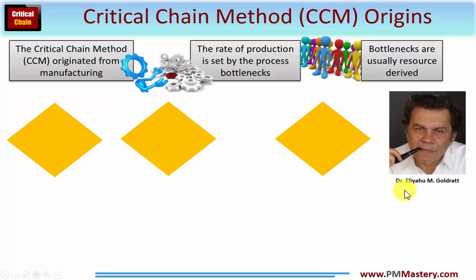The purpose of these two videos is to take you through step by step in a structured manner an overview of the techniques and approaches necessary. The critical chain method originated from manufacturing, where the rate of production is set by any bottlenecks within the process — and bottlenecks are usually resource derived, by which I mean human resource derived. You'll immediately start to see that resource limitations are also a bone of contention within your project.